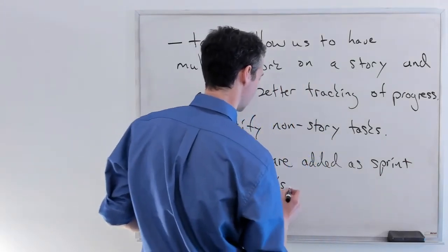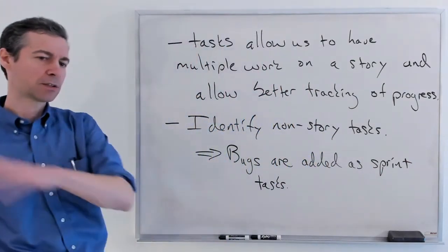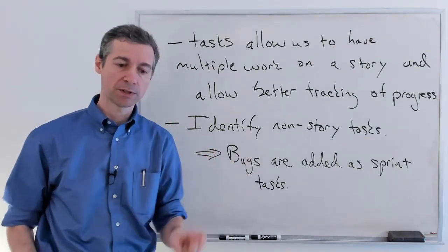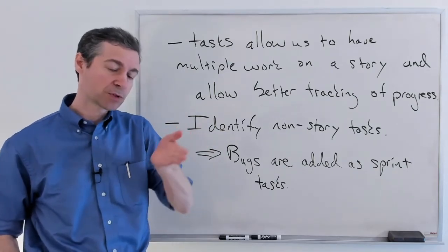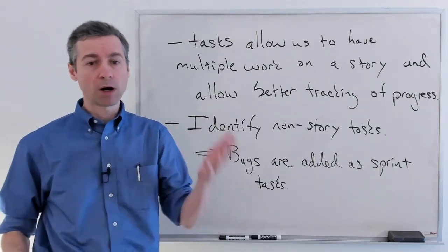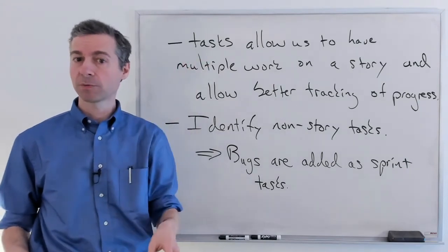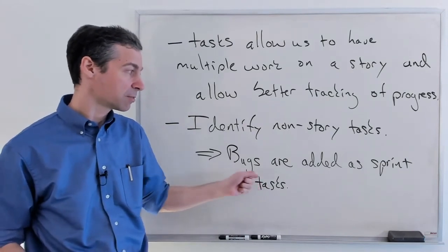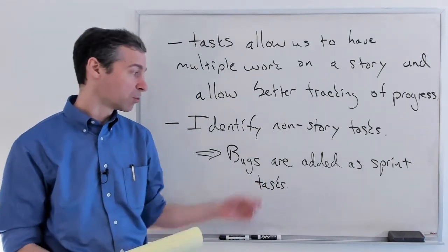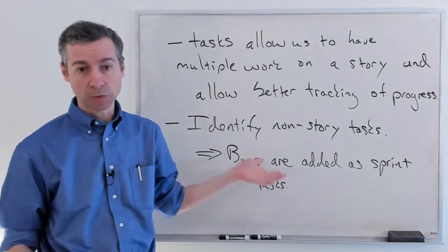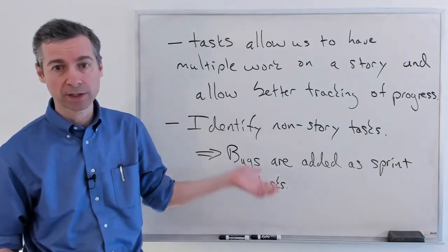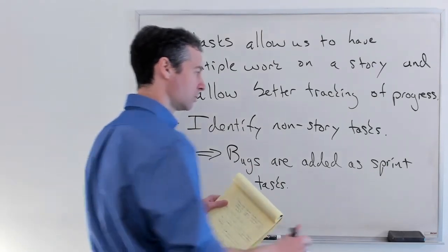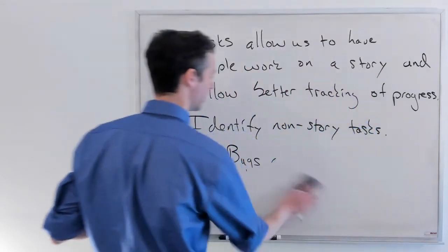Okay. So where should you record the bug? Not in a separate issue tracking system. Go stick it in as a sprint task. Label it as a bug. It's now something that the team's supposed to be getting done by the end of the sprint. If we discover bugs in the shipped product, that's high priority. We're going to get that work done. It needs to be in the sprint tasks. If you weren't to get that done in a sprint, it would stay in the sprint tasks for the next sprint. Okay, as you find bugs, put them into the sprint tasks to-do list.